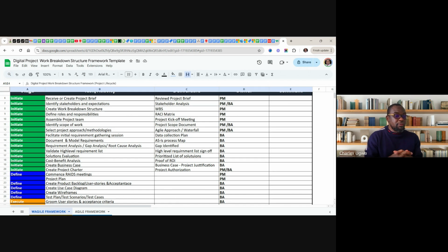But before you proceed, you need a cost-benefit analysis. On the solutions you selected, you need to do an appraisal. Cost-benefit analysis is you trying to weigh the cost of getting that solution and the benefit it's going to bring. So you need to weigh both of them on a scale. The benefit must be bigger than the cost, making the solution viable. You cannot bring a solution that is not cost effective. If the cost is way higher than the benefit, it means that it's not a good investment.